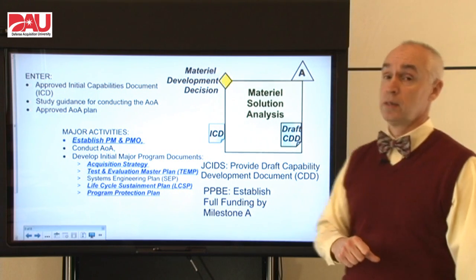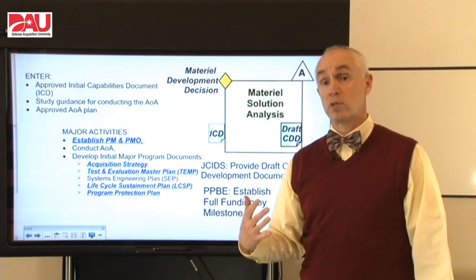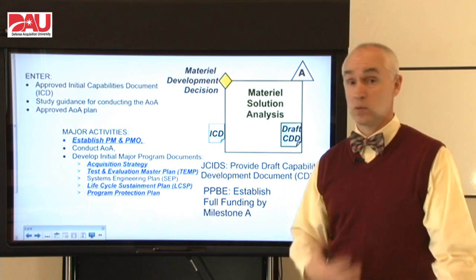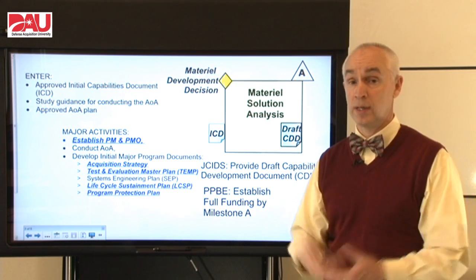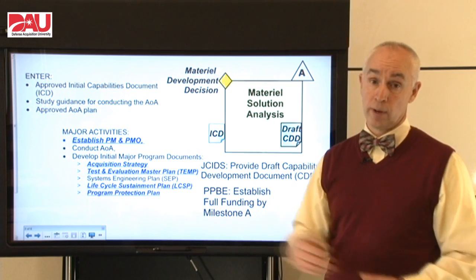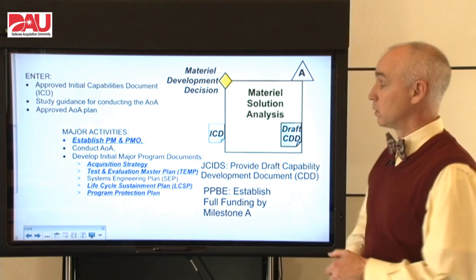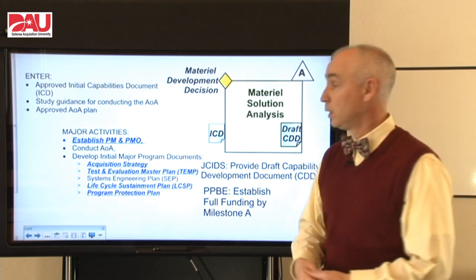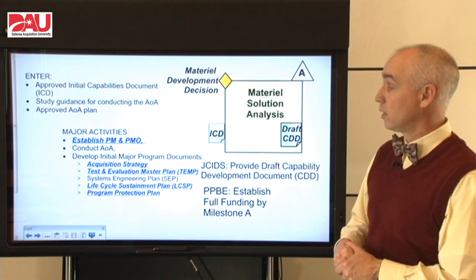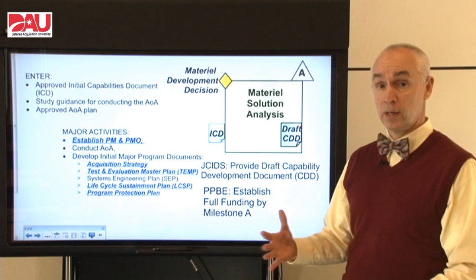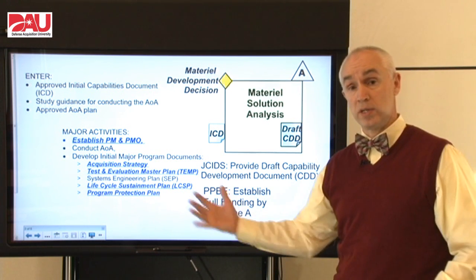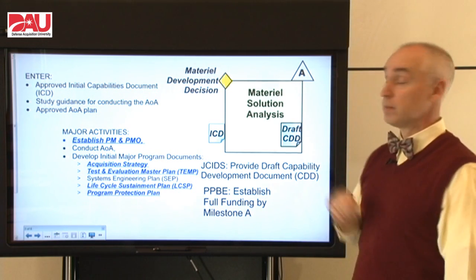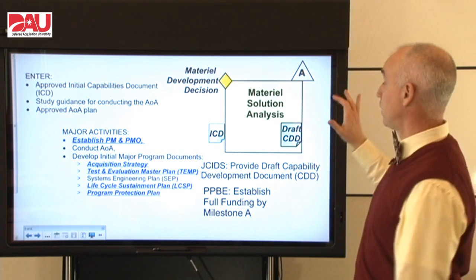We also need money. We have to establish full funding by Milestone A, and that is a fairly long process because only once a year do you have an opportunity to get into the budget and program for the out-years. Once we have picked a technology, got that approved AOA, an acquisition strategy, and the other program documentation necessary, then we are ready for a Milestone A decision to get us to the next phase.